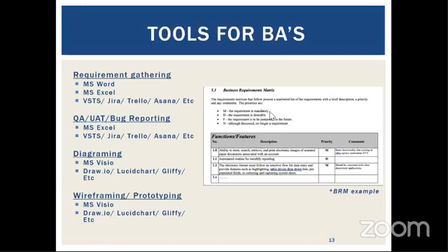Maybe we documented something and you know what? It's not mandatory. It's a nice to have. Maybe we can put it in place in the future. And then a lot of requirements that are discussed are no longer needed. So instead of just removing it from your documentation and forgetting about it, you want to notate it with an N, where it was discussed but no longer required.